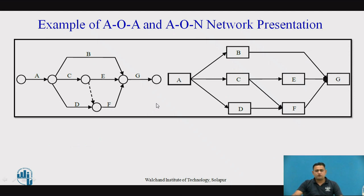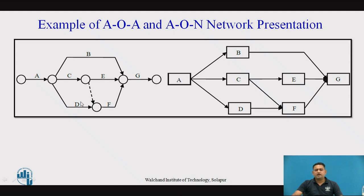This example shows the construction of a project network by AOA on the left-hand side and the same network represented by AON — the Precedence Network Diagram — on the right-hand side. The overall dependency is maintained in both network diagrams, but in the AOA there is a dummy activity, which is eliminated in the AON network diagram. This is the overall comparison between Activity on Arrow and Activity on Node network diagram constructions.